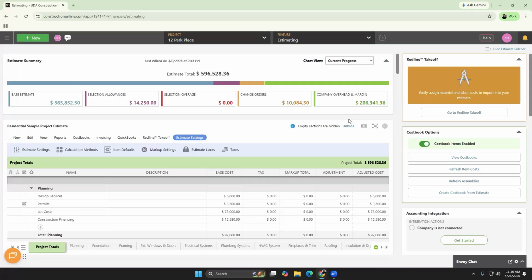Using the adjustments column is not going to affect the original contract value. They're tracked separately and don't go through a client approval workflow. This is usually something that is a cost burden or impact that is the builder's responsibility rather than something the client would accept any responsibility for.